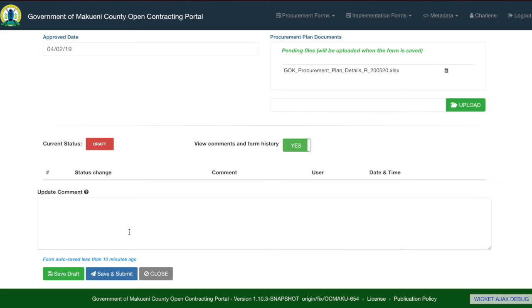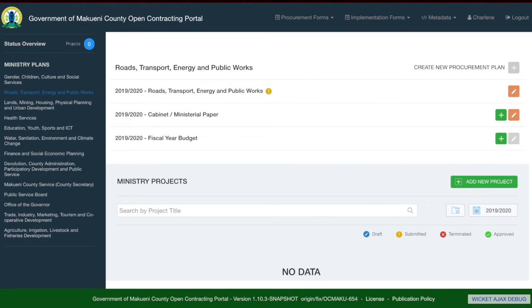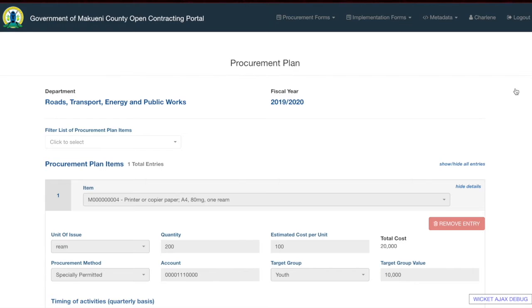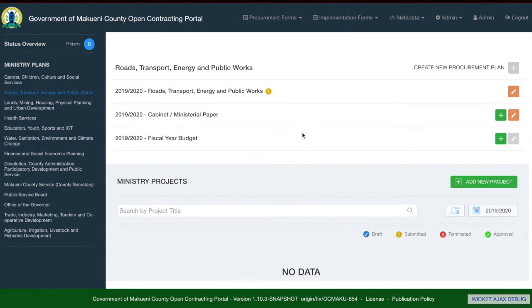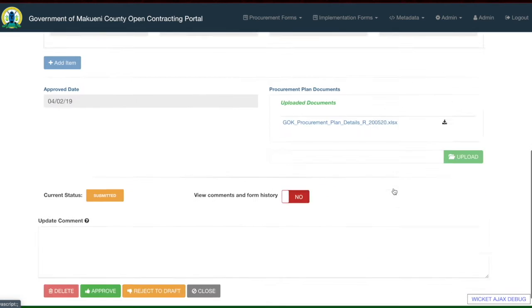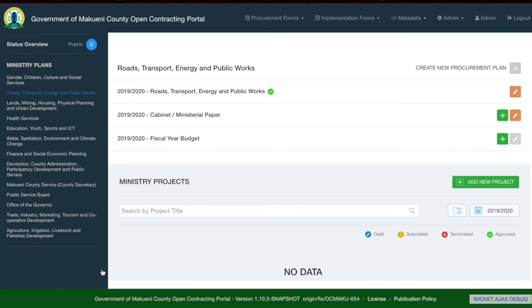Once complete, you can save as draft, which means you are still going to work on the form and have not submitted it for approval. If you are done editing, you can save and submit, which will send it to the next level of approval. If you submitted but would like to edit, you can reject to draft — this can only be done if the approver has not yet approved. Once approved, you will see the procurement plan name with the approved status next to the name.